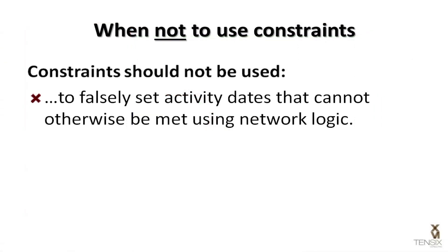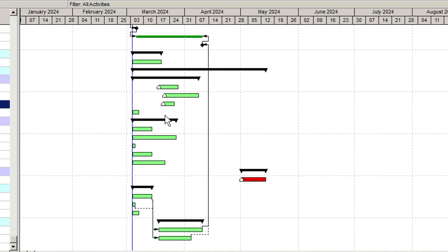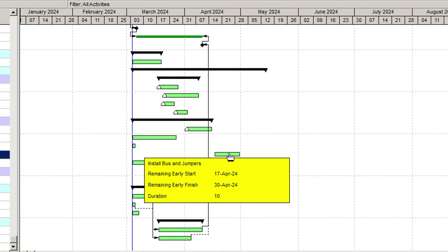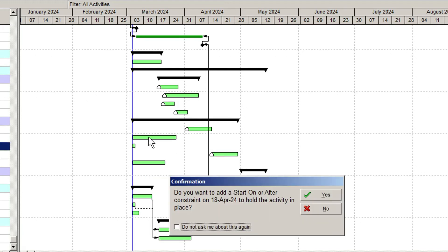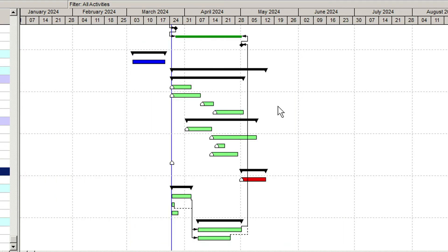Re-engineer the network logic to find a way to achieve the desired dates. Constraints should not be used as an alternative to activity relationships. Using constraints in place of activity relationships diminishes the validity of the project schedule. When the project is progressed, activities that are not dependent on preceding activities will not be affected by delays in the schedule.